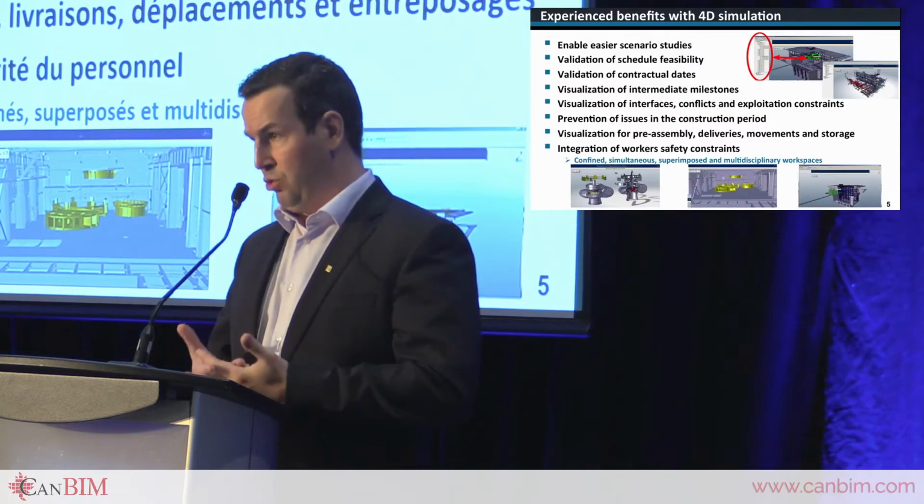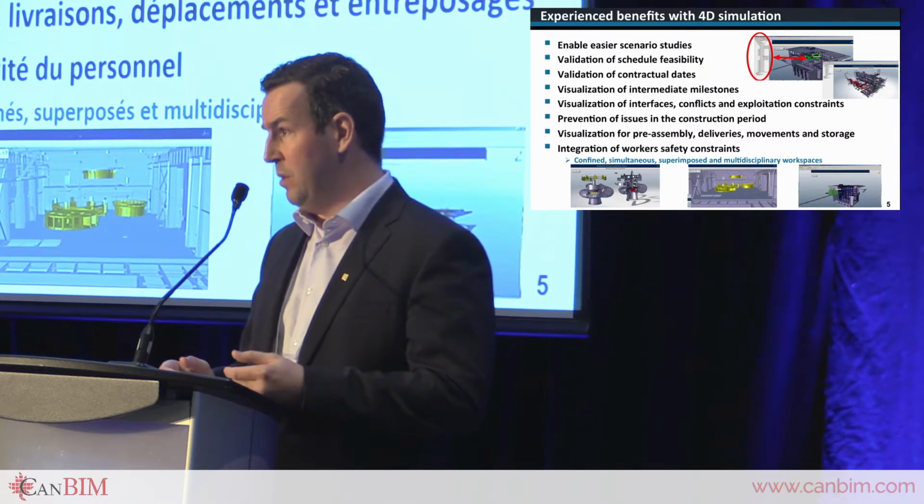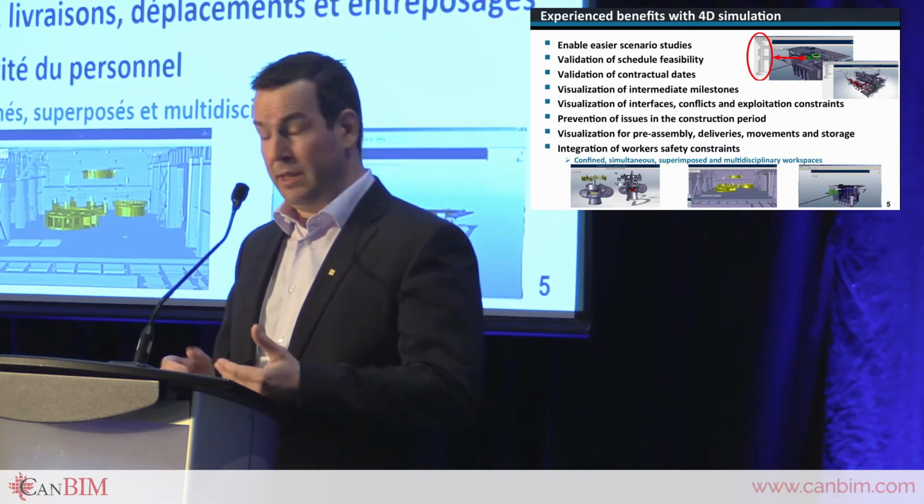So what are the benefits? If you're not familiar with 4D, or even if you do know about it, I can tell you what we've experienced. We had a selection of scenarios. We had the constructability. We could validate the contract dates. We could visualize interim acceptances and milestones. We could look at the interfaces, interferences, and operating constraints.